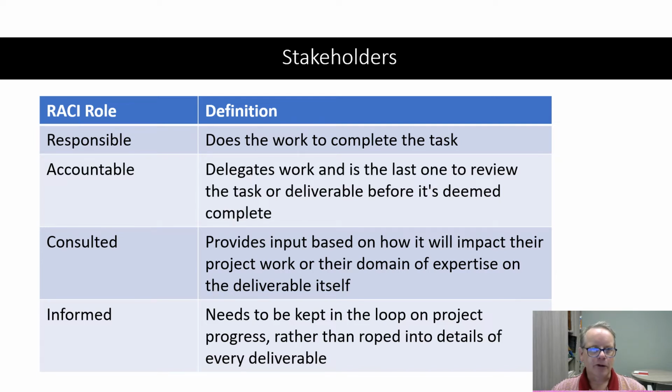In order to manage stakeholders effectively, we need to be able to identify them, assess their knowledge and skills, and analyze the product to ensure their needs are met. It's best to get them involved early by assigning them work, using them as experts, reporting progress to them, or involving them in changes and lessons learned. Stakeholders that have an influence on a project need to be managed effectively. That is, kept up to date on progress and consulted as roadblocks come up.